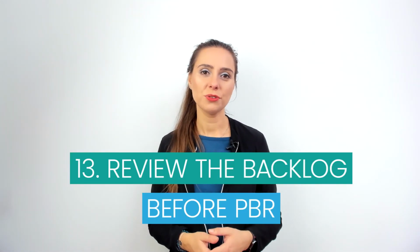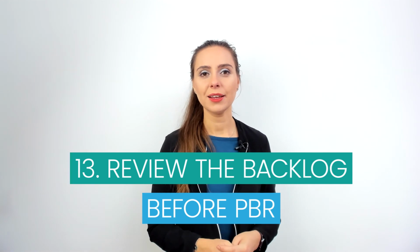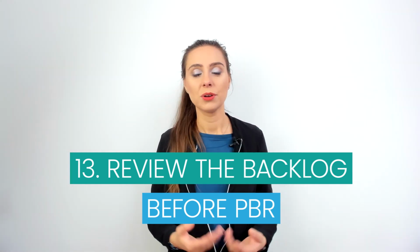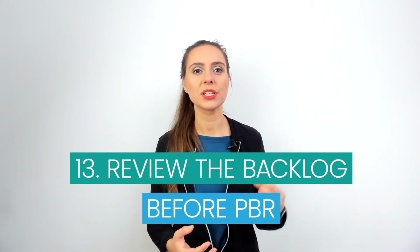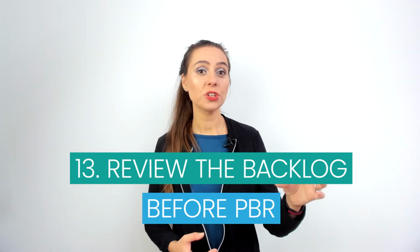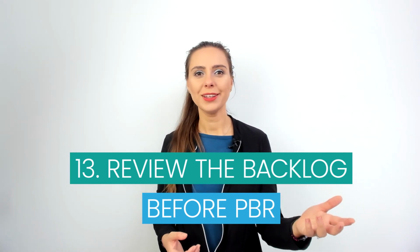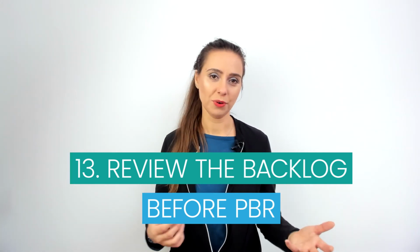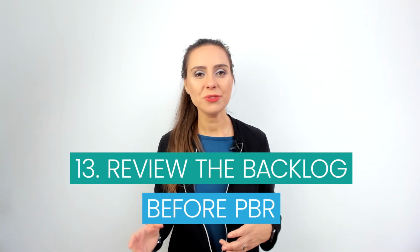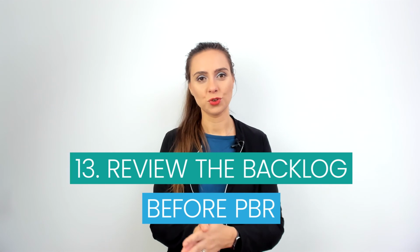Alternative number 13. Use some collaboration tools to review the product backlog before the refinement meeting. This is something that I implement quite often with the teams. So whenever we arrive to the PBR session, there are less discussions. We only talk about the questions, we only verify our understandings, we only talk about our cool ideas, because whenever you take some time before the meeting, you know what's coming up, you are not surprised. You can do quick research, something that is hard to do whenever you are seeing a certain functionality for the first time.